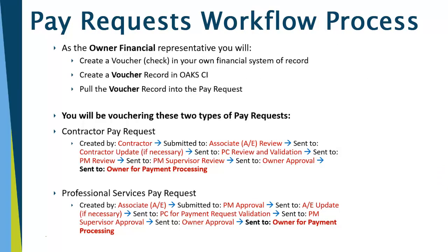As the owner financial representative, you will create a voucher or check in your own financial system of record, record that voucher record in OCI, and then pull that voucher record into the pay request.